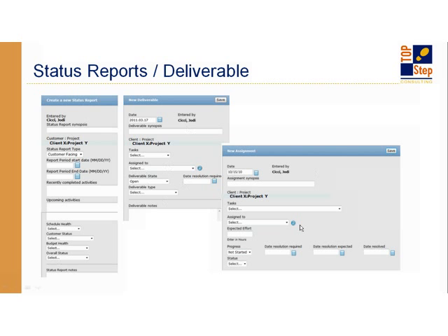And then here's another one as far as detailed to-do lists, okay? Hey, I need you to actually set up the sandbox and I need you to load test data. But that all is under UAT or implementation. So this is a detailed activity associated with a certain task. I'm assigning it to you. I expect it to take you 2 to 4 hours. And it needs to get done by next Tuesday, okay? It gives you the ability as a project manager to track whether you've asked for something to get done by next Wednesday and if it actually was done by next Wednesday.